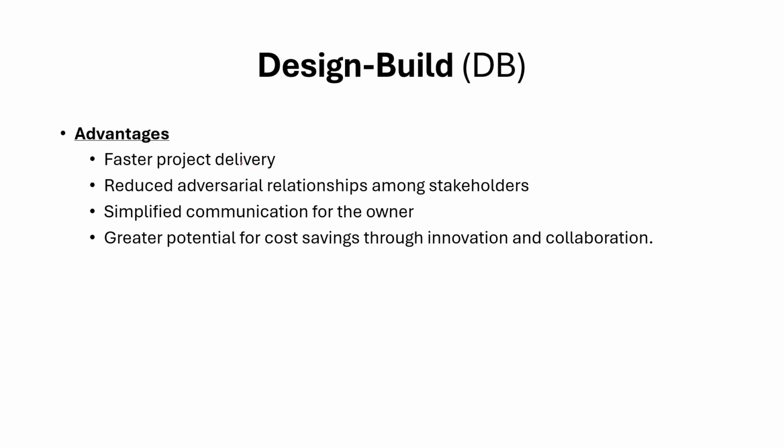It reduces adversarial relationships among stakeholders. There's streamlined communication where a single entity is accountable for the entire project, reducing delays caused by miscommunication between designer and contractor. There's a greater possibility for cost savings because a design build team can optimize design and construction costs from the start. And early collaboration fosters efficient and innovative solutions, such as integrating smart technologies within the firm.